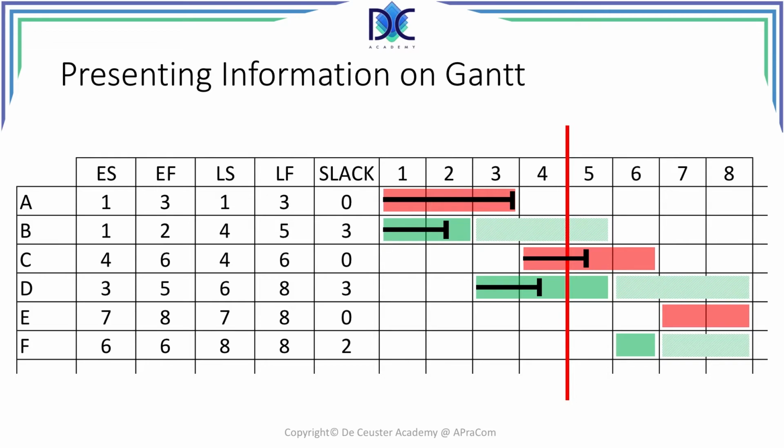So we have to take into account what will happen, and when we think the activity will be completed. It's an activity which is not on the critical path, so we may feel comfortable, but we have to verify because there may be a dependency between task B and F. So when task B is late, it may have an effect on activity F or on activity D, but we see that activity D already started, and it means that there is no relation between B and D.